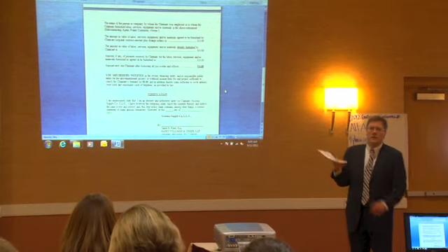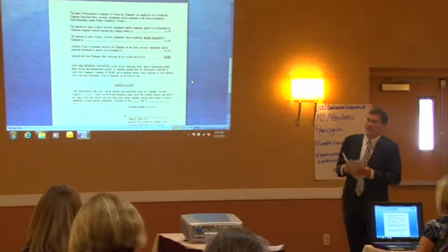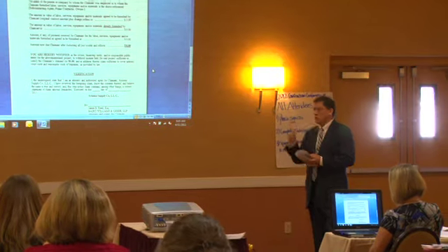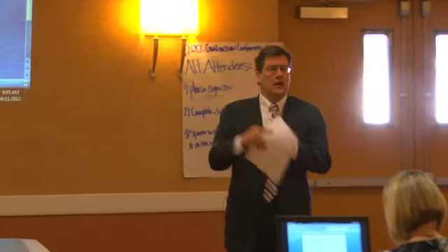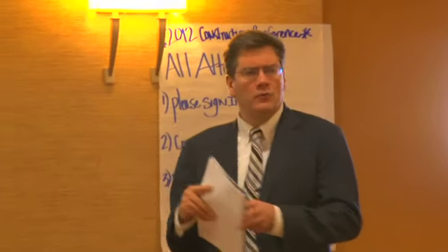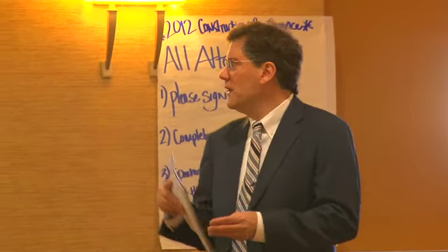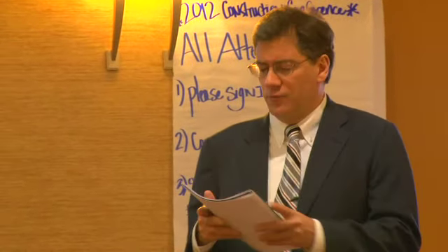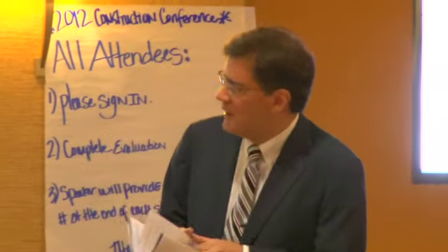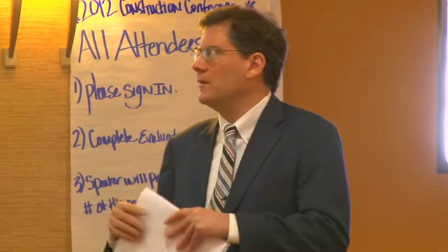Now, you sue on this just like you would sue to foreclose a lien claim. So sometimes if you recorded a lien claim and you've sent out a stop notice, your lawsuit now is going to be count 1, breach of contract, count 2, personal guarantee breach if you've got those, count 3, lien claim foreclosure, and count 4, stop notice foreclosure. When do you have to serve these? Let's go to the timeline.